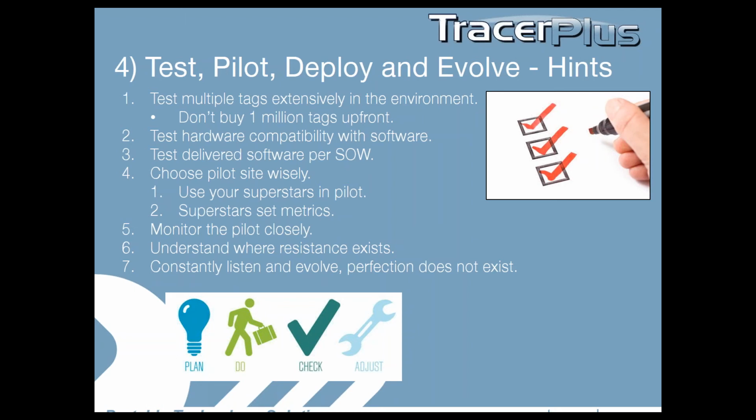This is one that we've been running into lately as we're doing bigger and bigger deployments. Choose your pilot site wisely and use your superstars for the pilot. What we mean by this is you're going to want to see with your pilot what's possible, what works, what doesn't work, where we need to refine the application or the hardware, the tags. And we want to see best case metrics.